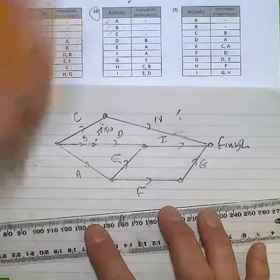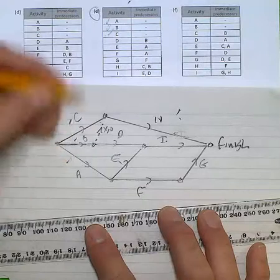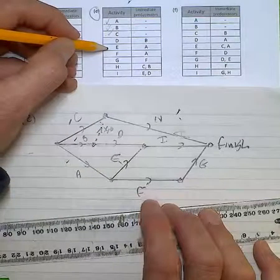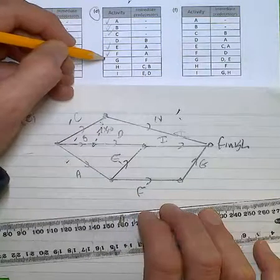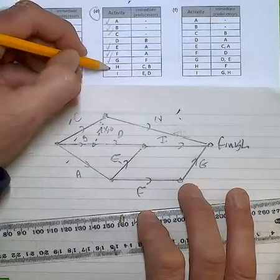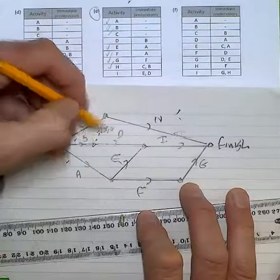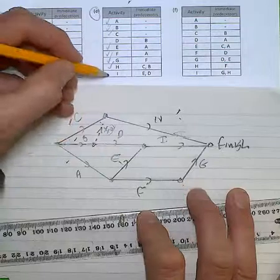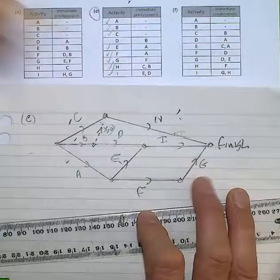A, B, and C kick things off. E requires A. F requires A. I've got that. G only requires F. H requires C and B. That's where we had to put that dummy edge in. And I requires E and D.